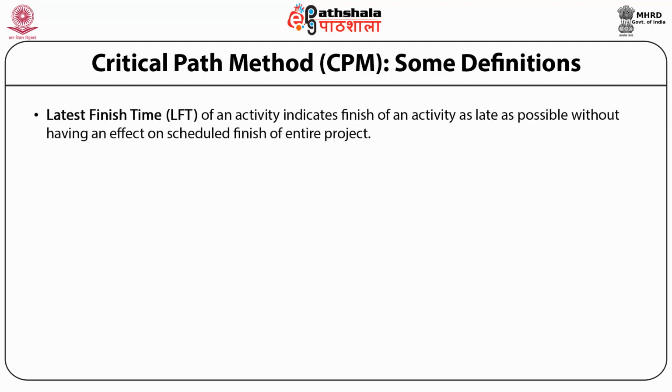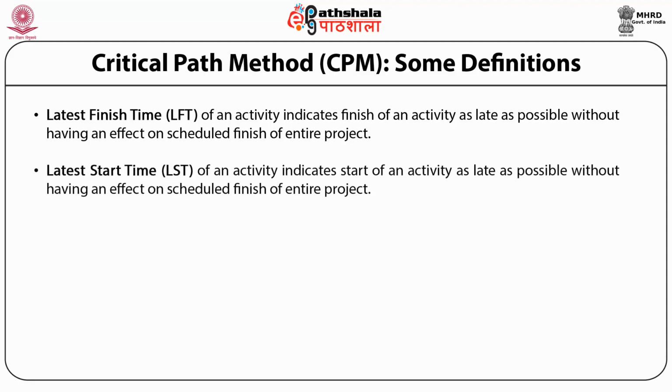Latest finish time, LFT, of an activity indicates the finish of an activity as late as possible without having an effect on the scheduled finish of the entire project. Latest start time, LST, of an activity indicates the start of an activity as late as possible without having an effect on the scheduled finish of the entire project. LST is the difference of LFT and duration of the particular activity.